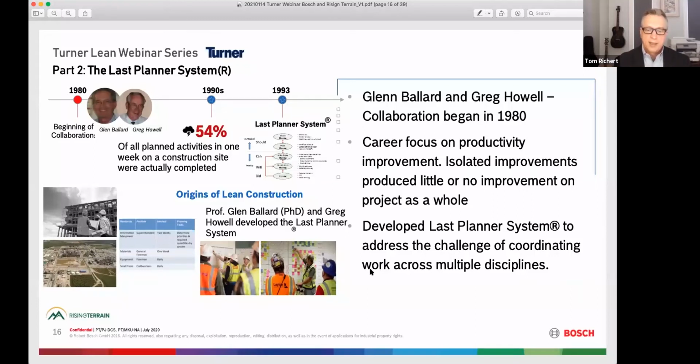They started with weekly planning and the daily check-ins. They later added look-ahead planning, and then ultimately added pull planning for the phases, so that this all came together as a system. But that took the better part of a decade, really, before all of that came together.